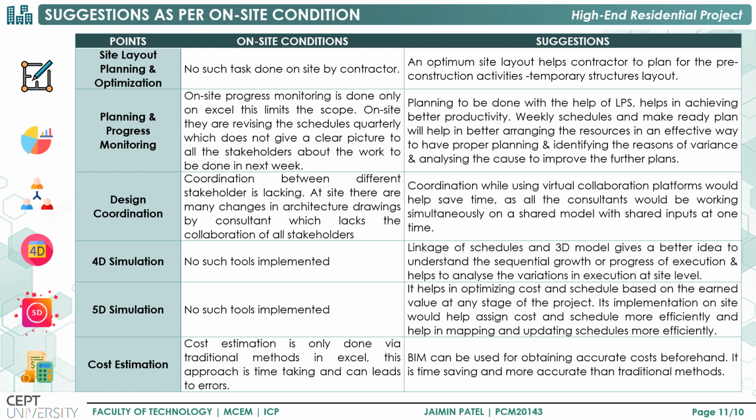And lastly, some suggestions are given by us as per the site conditions, like at site, they are not making any site layout planning. So suggesting them like doing this, it will help in planning pre-construction activities and temporary structures. Next, we found that at site they made a schedule in MSP, but now they are using Excel for tracking and scheduling. So they can use MSP or Primavera for scheduling and revising, tracking, updating actual status, which will help in analyzing the delays with faster results.